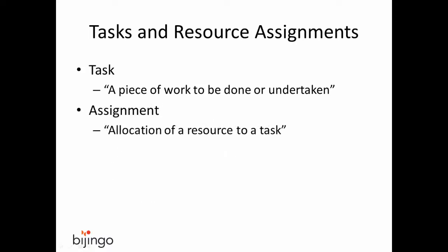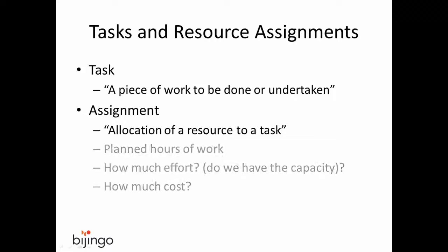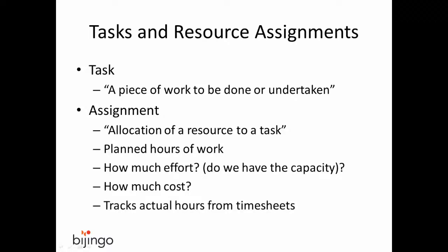Assigning resources to a task makes it visible on their timesheets and also defines the hours of work allocated for each resource to complete the task. Actual hours from timesheets are recorded against resource assignments.